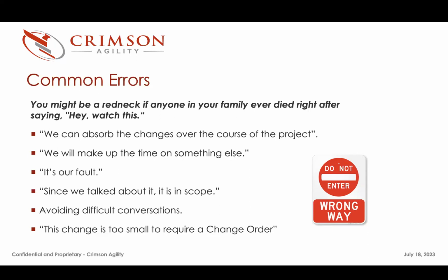Another misnomer is, since we talked about it, it is in scope. Clients in many cases have bad memories. They feel like, well, we talked about this during the sales process, but they forget that they jettisoned it or threw it overboard because they wanted to manage costs. Or we talked about it, but it wasn't clear to us that that was a requirement. So if it's not in the statement of work, it's not in the scope.